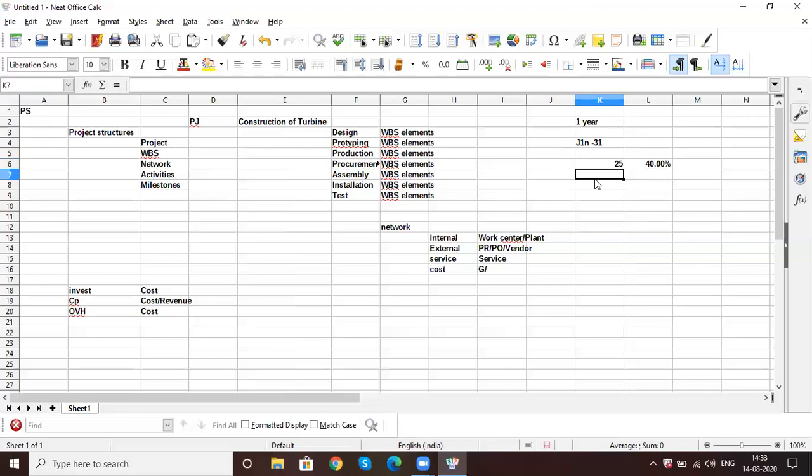And after completion of another 25%, which is 50%, you need to give me 80%. You need to release another 40%. And after 75%, you need to release my another 10%. And finally, after 100% is completed, you need to give 100% of a payment, which is the milestones.